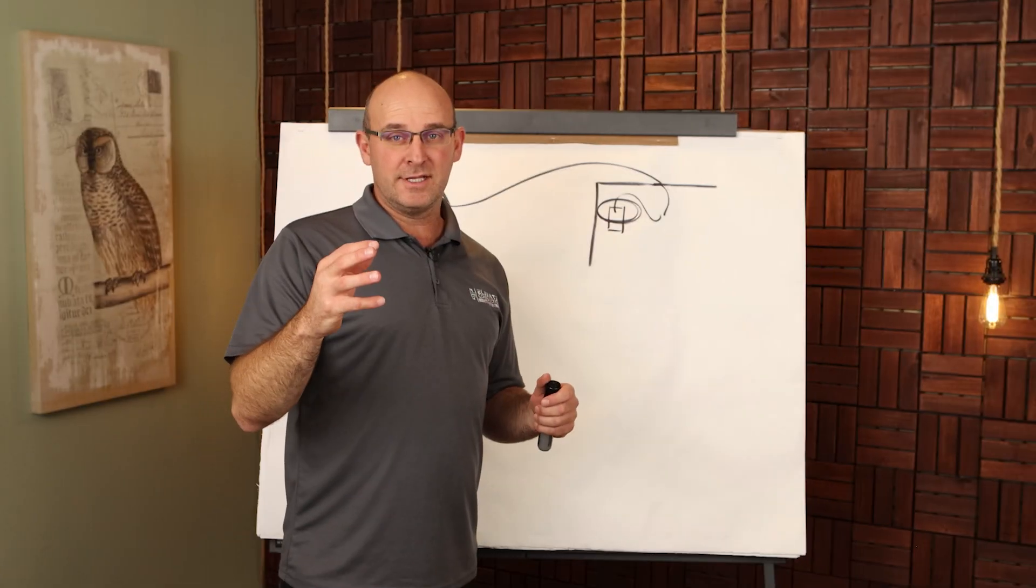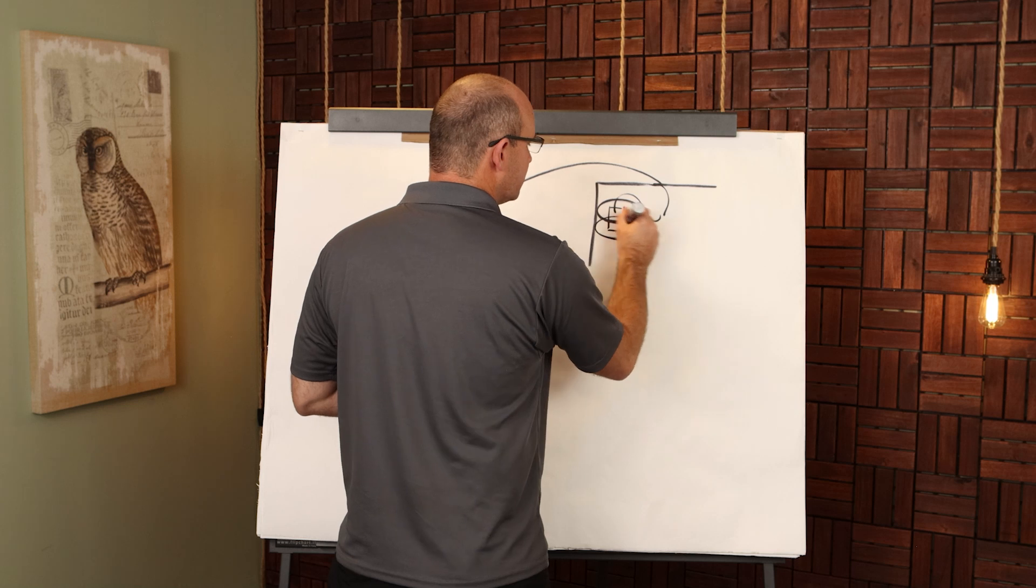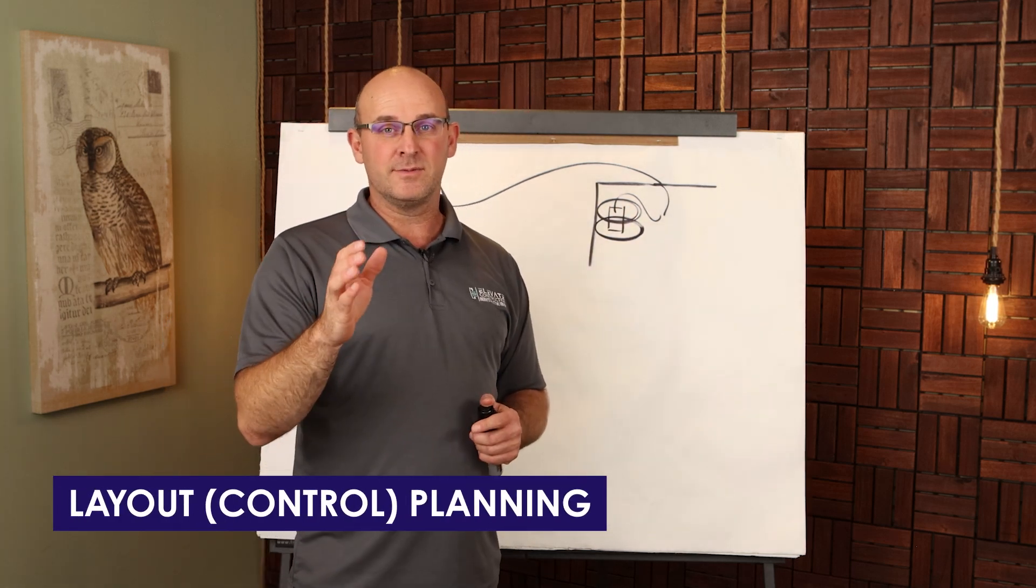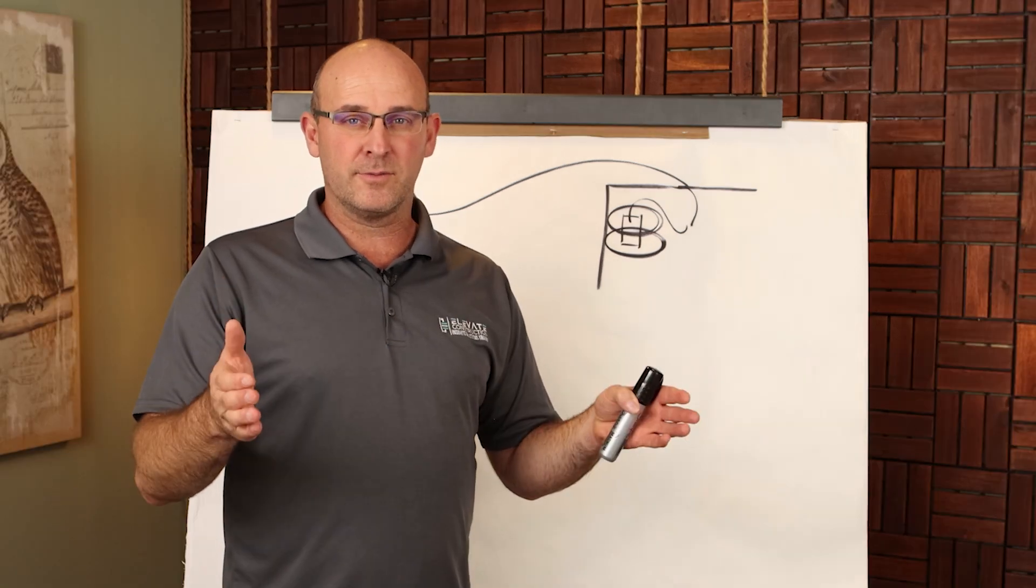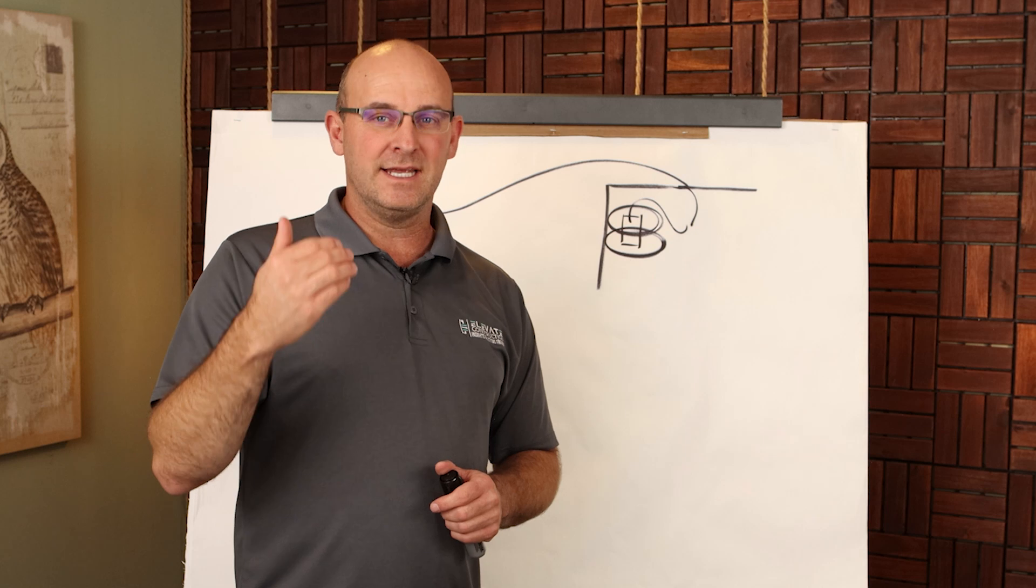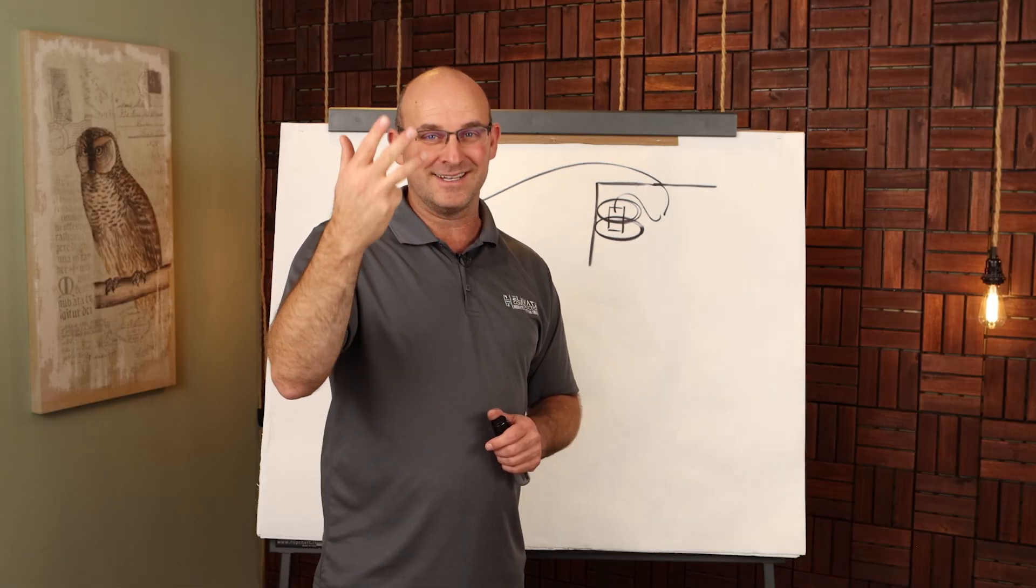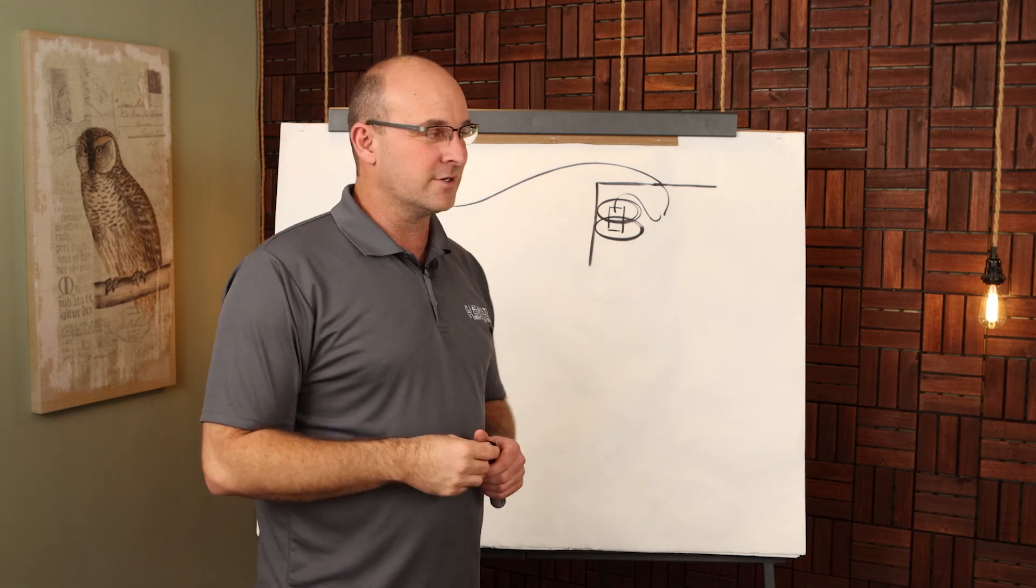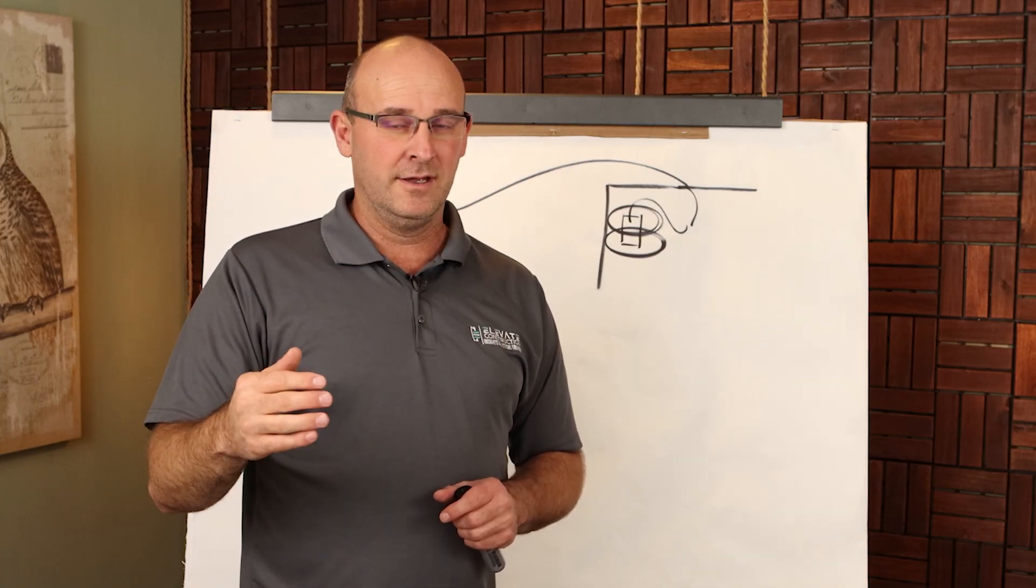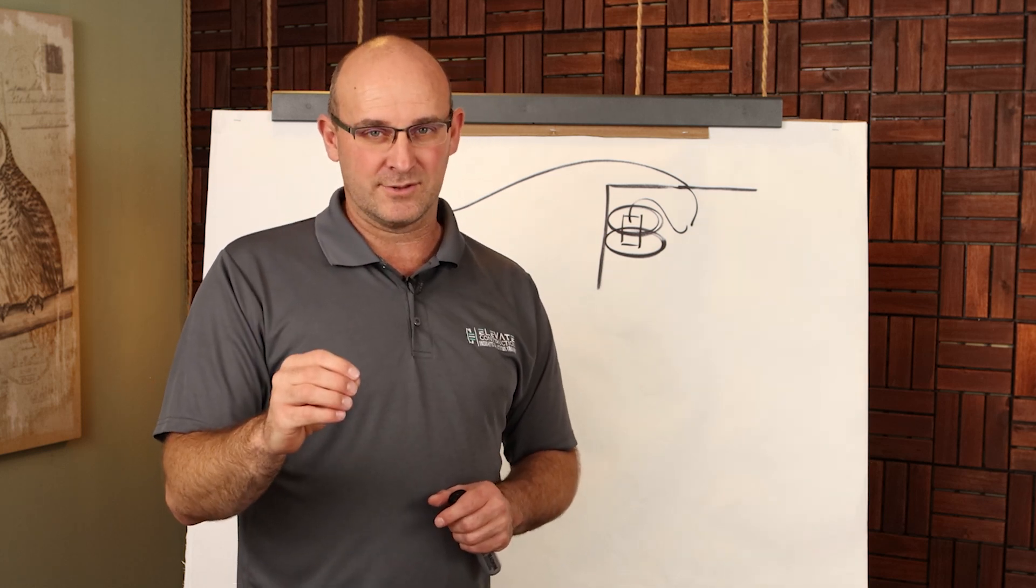Another thing that you can do in the morning when you're in the trailer in addition to the lift drawings is layout or control planning. This might seem a little bit silly but you're going to print out your floor plans or your civil sheets that have your monumentation and any other layout that's established, so monuments with X, Y, and Z so that means that you have a benchmark there as well. Actually look at the work that you're going to lay out that day and create a drawing that really gets you to that layout accurately with the right double checks.